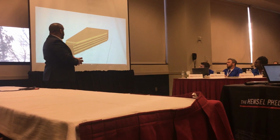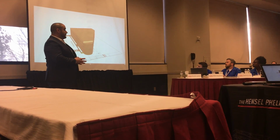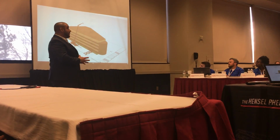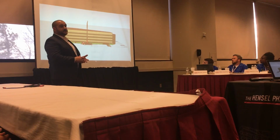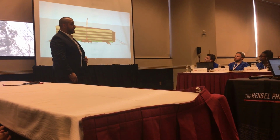Now, with this building, the owner, it's going to be a build out for a medical facility, and with that comes a lot of heavy medical equipment. So we're going to have to do a lot of structural steel upgrades in order to accommodate our medical equipment, especially the MRI machine, CT scan machine, and our tables and equipment in our operating rooms.